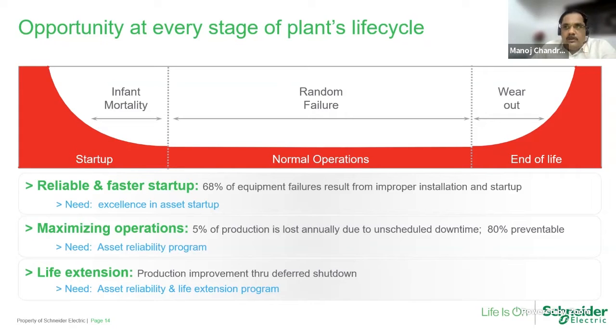I come from the process automation domain. In the process automation domain, we have process instrumentation, temperature transmitters, valves, etc. And an individual transmitter can take up to 45 to 60 minutes to commission. And an average plant would have 3,000, 4,000, 5,000 of those instruments. You can imagine the amount of intensity it takes.